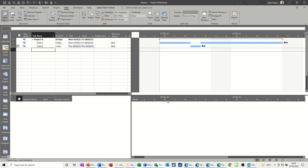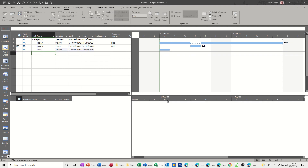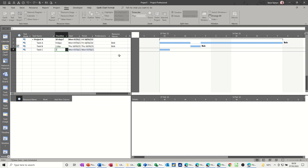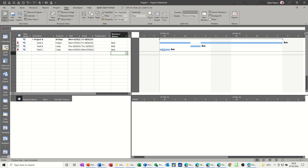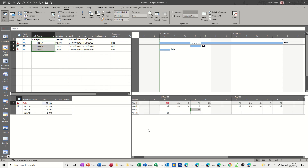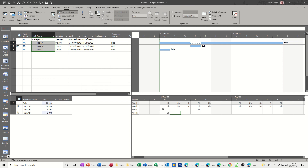If I do a Task C — let's see if I can show you that. Let's get Bob on that again. So Bob's on there and he's gone red again. But if I click on these and highlight them so it comes active, let's say he just does two hours on that task, and two hours on that task — he's no longer over-allocated. So this is a more accurate way to allocate resources and be more precise. You can update this if they spend longer on the job. Putting that down, he's no longer red, so he's not over-allocated. And that's how you split a task and how you can move people into those splits.